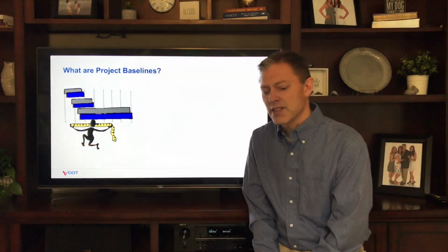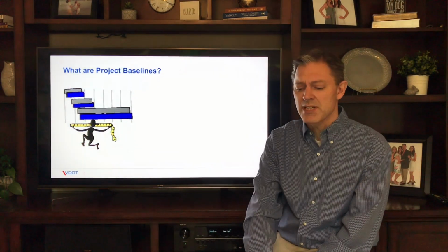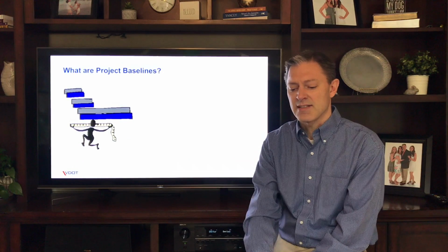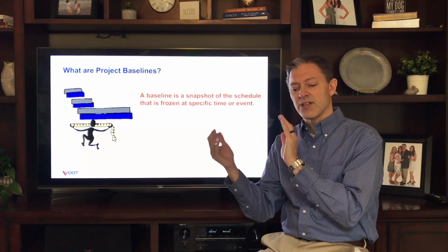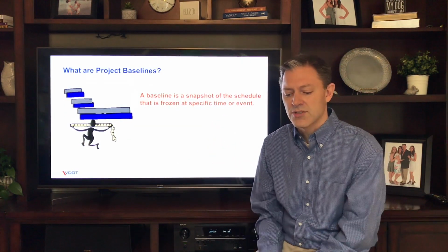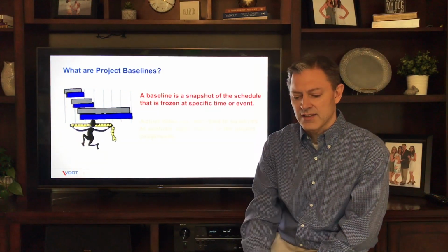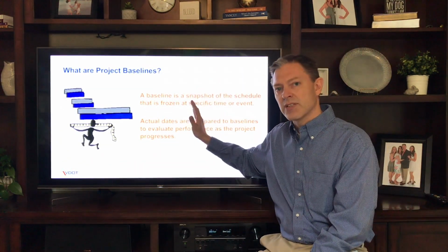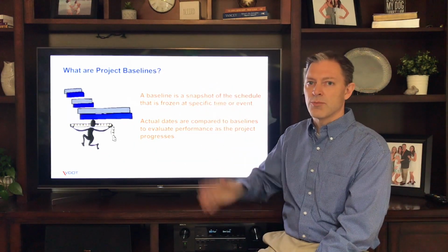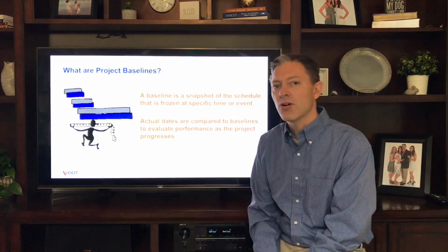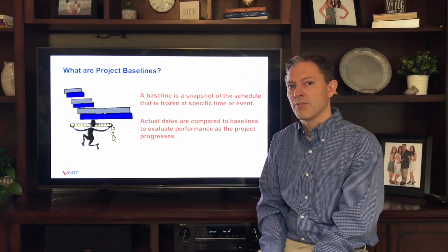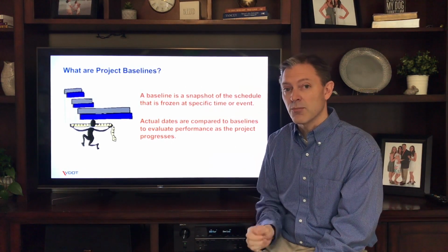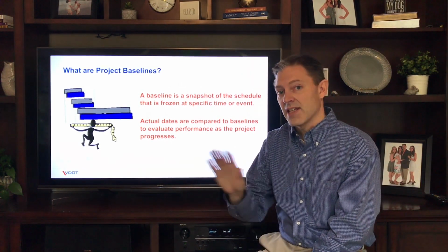So let's talk about project baselines. Project baselines are basically snapshots of a schedule at a certain time. So we take those within PWA automatically, and those snapshots, those baselines, are what the actual dates are compared against to determine your performance on dashboard. So determining exactly what those baselines are and being cognizant of them is very important to the success of your project as it appears on dashboard.